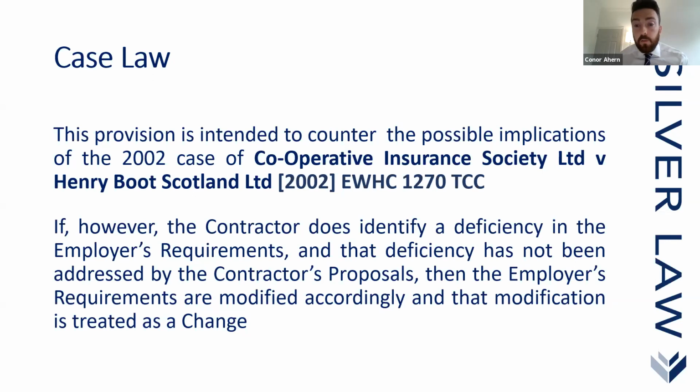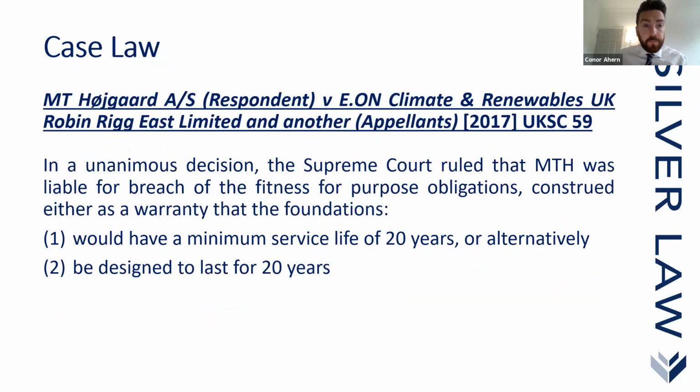Now, that's basically a deficiency in the ERs which is not addressed by the CPs, becomes a variation, and that's what clause 2.12 says also. So yeah, you can see what's going on with the operative clauses within the DB form itself.